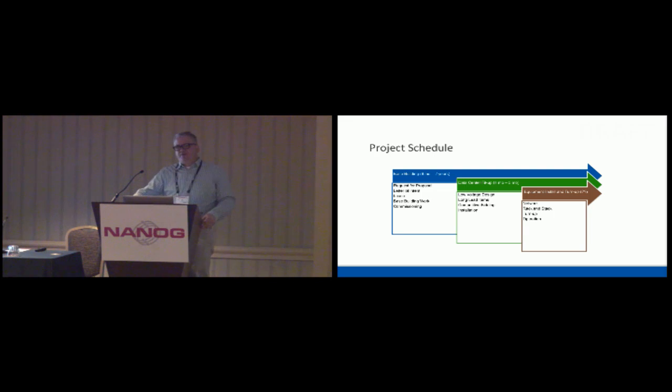When I look at data centers, I'm always interested to see that when you pull down a fiber provider's fiber build, there are these big loops, and the data center is on the loop. Great. But if you then say you need 12 fibers, they say, well, I've got this section over there that I built with somebody else, and I don't have 12 fibers left on it. So I'm going to have to go back out. Maybe I have to permit it. Maybe I have to go through a process. I can give you 6 fibers to begin with, but it's going to take me 7 or 8 months to get those other fibers built and give them to you. So it's important to tease those things out early in the process and get that in place.